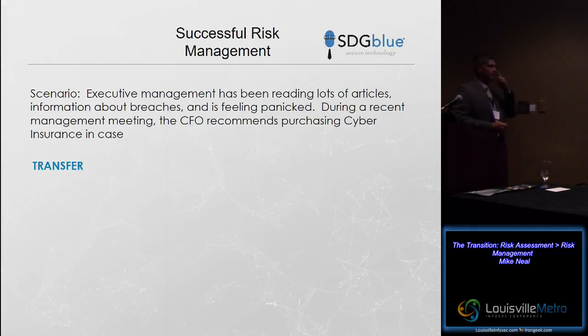I can transfer by taking data that we're supposed to dispose of on hard drives, on tapes, on whatever, and have Shredit or Iron Mountain, one of those folks come in, destroy that data for us, give us a log, certificate of destruction. That's also transference of risk.